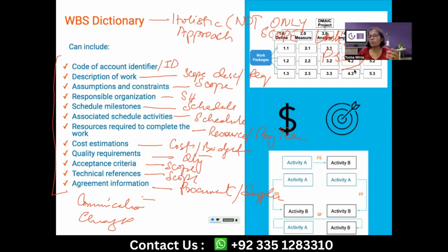In my case, when I used to be creating the scope statement, because I was associated with the software industry, for each of the forms or screens that we were making, for each of the elements on the form, like its type, its constraints, when it's failing, what text is going to be shown. I mean, different attributes associated with each of the elements on the wireframe. We used to explain that for our developers and for our designers and quality people as well. Point being, everything about the scope, 100% scope, but scope only.